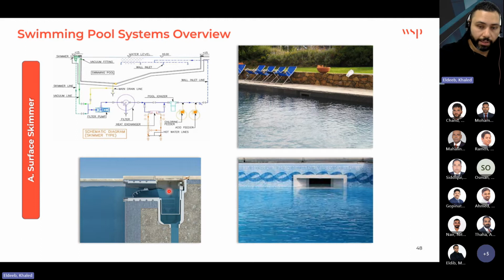Everyone relies on each other, and then we reach a point where the supervision on site doesn't know who is responsible, and then we provide what is called a slow down chamber, a holding tank. Many projects do it like that. This is not the best solution actually, but when you discover this too late, you have to provide such solutions in order to resolve it. We'll discuss this also in detail.